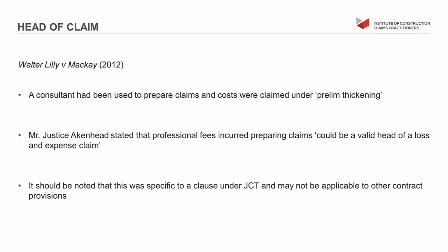So the basis on this is, if you're putting forward a head of claim that seeks to recover the costs of preparing that claim, cite Walter Lilly versus Mackay as your justification for doing it, and mention that it was held in that case that professional fees incurred could be recovered as part of a loss and expense claim. It just provides that little bit of justification and puts the weight of the law behind you, assuming, of course, that UK law is applicable to the contract or the jurisdiction that you're working in.